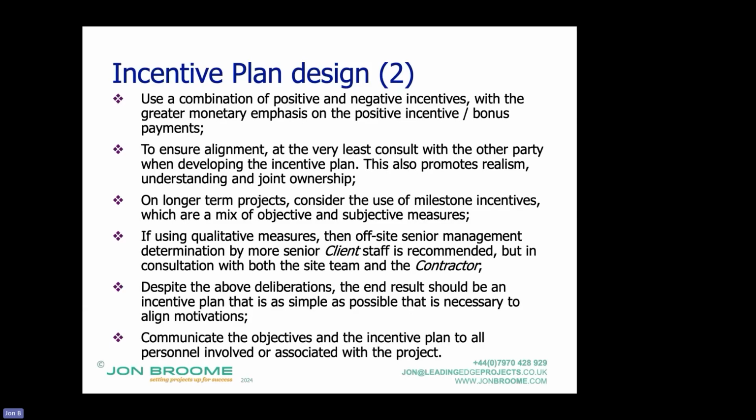Because the contractor got the understanding about what the client was really after and what mattered. The client understood the contractor's cost drivers and how they could go about achieving it. So it promoted realism, it imposed understanding, and it imposed joint ownership, especially of those bonuses.